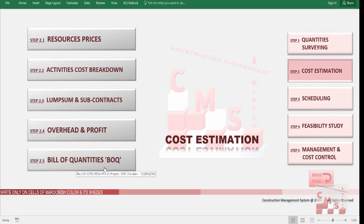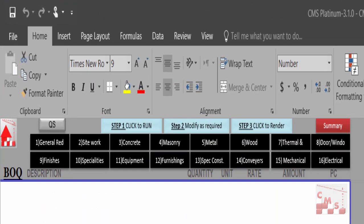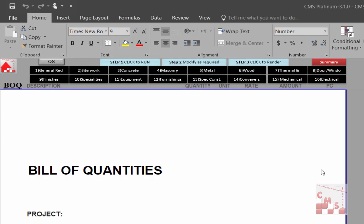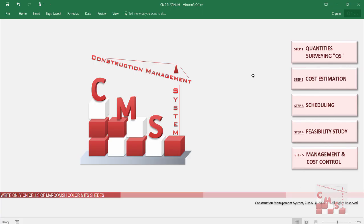CMS will provide the bill of quantity with all the construction divisions, starting from general work, site and earthwork, concrete, masonry, metal, wood, thermal, doors and windows, finishes, special items, conveyors, mechanical, electrical, and external work. CMS will produce a ready bill of quantity without any effort on our side. CMS also provides a detailed cost estimation, calculating a detailed breakdown for each activity including all direct and indirect costs automatically.